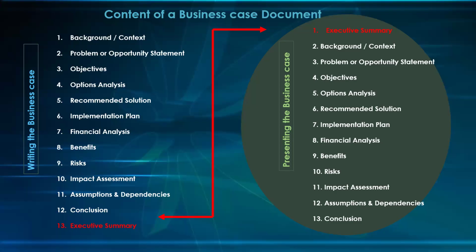If it's a high risk, that involves him going back to the sponsor or to the board for approval for that change, because it's risky. He needs to make them aware of the change, so he will involve them at that level. That's why you do your impact assessment, to see what level of involvement you will need.